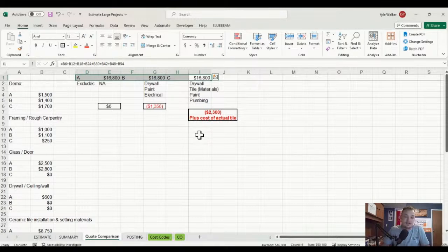He's going to use your nasty old plumbing, or when he decides inevitably that your plumbing is outdated, he's going to tell you, hey, when is the plumber going to get here? And you're going to get caught with your pants down going, what? I thought you did that. Your bid was $17,000 and you don't have plumbing. No, I excluded that. Did you see it on my quote anywhere? I didn't say anything about drywall or plumbing or paint.